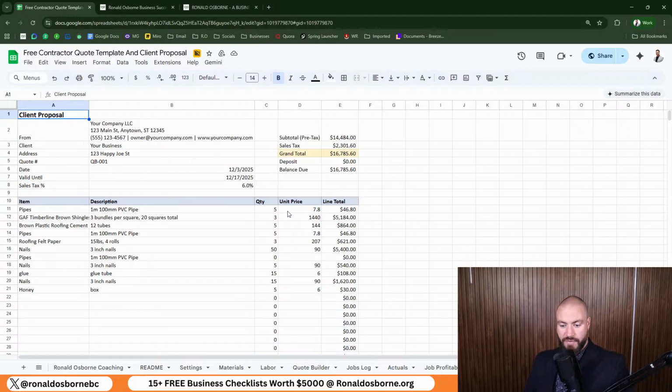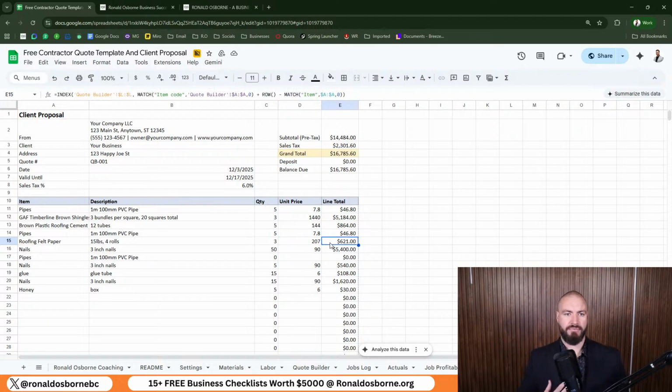And the reason for that is if you've got someone that's trying to nickel and dime you, when you need to build line items like this, if they can actually see, well, you're getting it for, as an example, let's just say you're getting it for $600. But then when they add the total up the top, they say, wait a minute, this isn't $600. It adds up to 20% that you've snuck in elsewhere. That's why I don't advise that you actually do that.